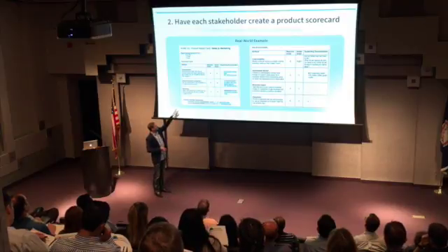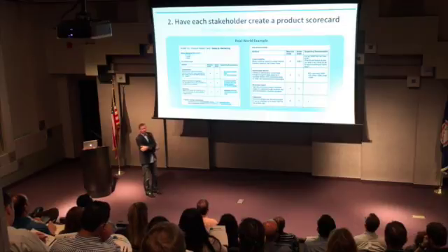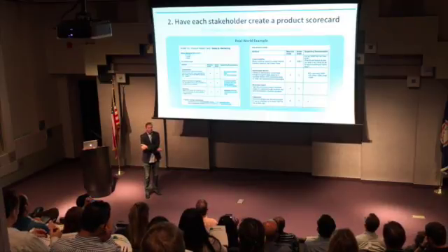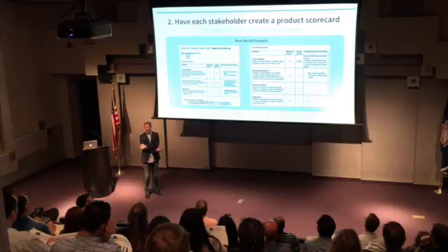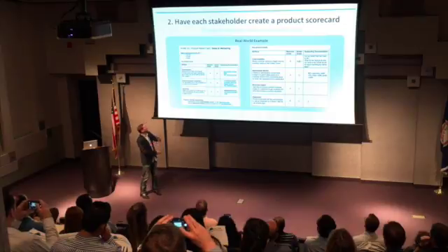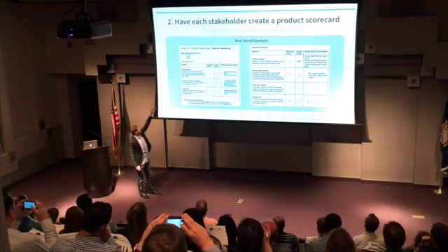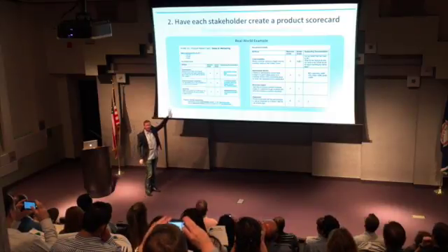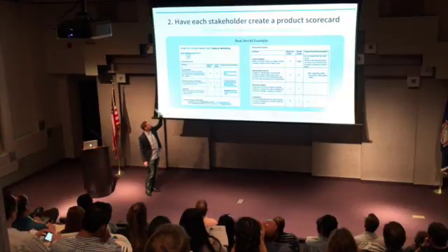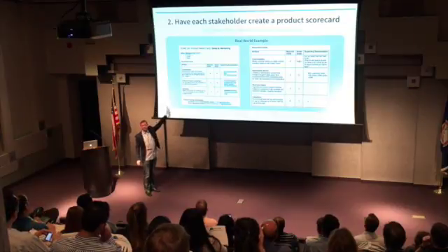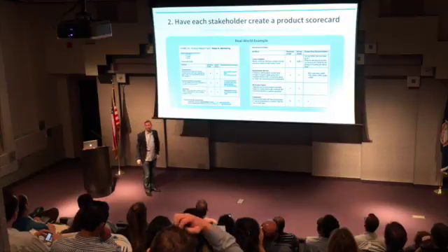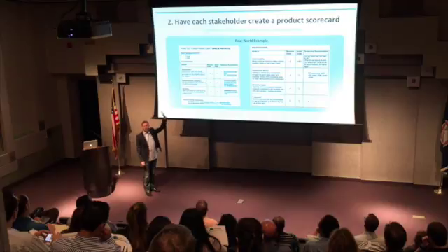This is a template that I tried to create for some of the companies that I've been working with, and it's basically just a one-pager report card. You can have 5 one-pager report cards spanning the whole company, and that by itself will tell you, for the most part, really what you need to know. Here's the metrics that we're looking to hit, the attributes that we care about. Again, these are not features. These are descriptions of the product. It needs to be customizable. We need to win on a feature-by-feature comparison, and we need to have stickiness because otherwise our customers might abandon us. This is a good example for maybe a SaaS company of what the sales and marketing team might say.